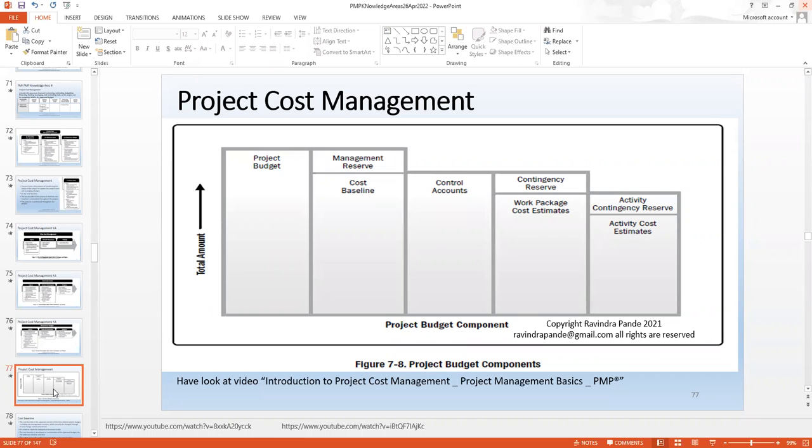All these things get deducted as a management reserve, and this management reserve is in the vicinity of 20 to 30%, which is an overall industry generalization. Your organization might have it at 22, might have it at 35 as well, because the way organizations assign planned cost to a project differs a bit, so there's a bit of approximation here in terms of management reserve versus cost baseline.